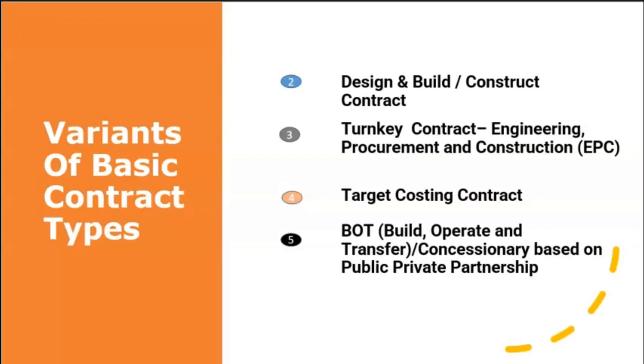Costs and risks are borne by the investors. Proposed tariff, that is revenue to investors, is a major consideration in bid evaluation. Concession agreement should be between 15 to 30 years before transfer of facility to the employer.